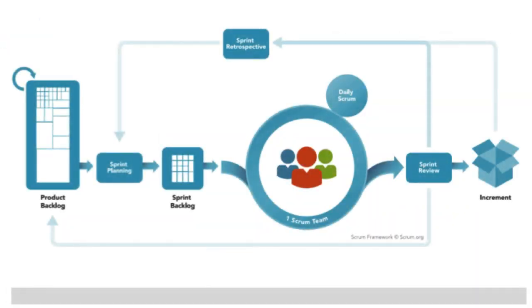Before diving into the details of the Scrum framework, it's useful to see the big picture and understand the structure of the framework. You'll be learning the details in subsequent lessons. As you can see here, there's an artifact labeled Product Backlog. You can think of this as a list of requirements that is prioritized by the product owner. The product backlog is a living artifact and never completed as long as the product exists. As you heard earlier, Scrum uses time boxes. The sprint is a time-boxed event that all other events as well as development team work are inside of.